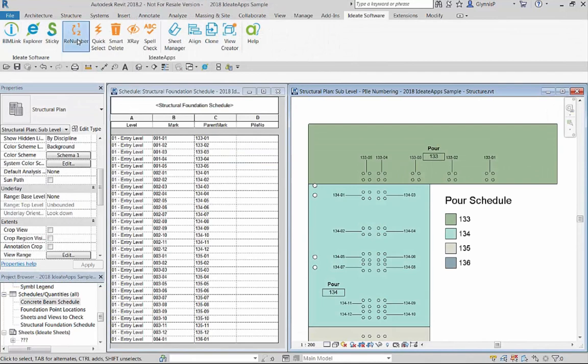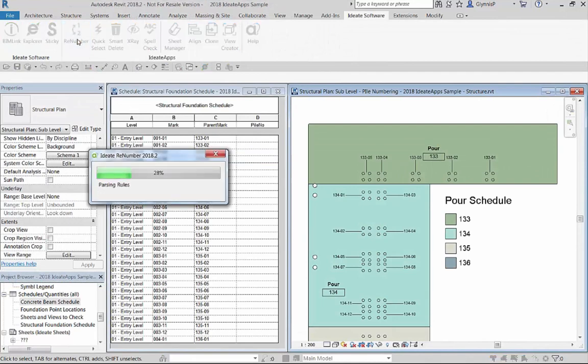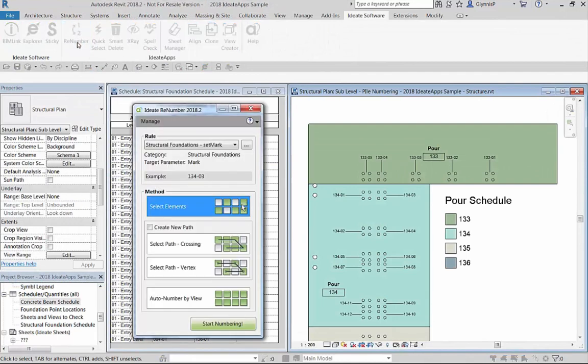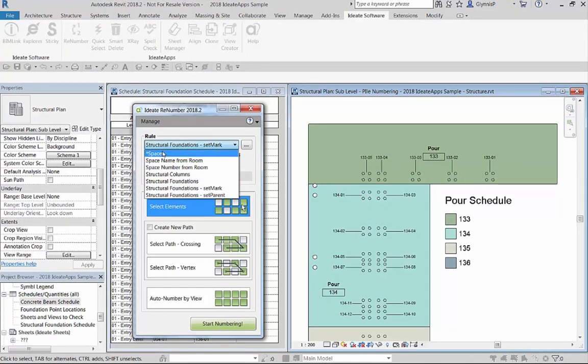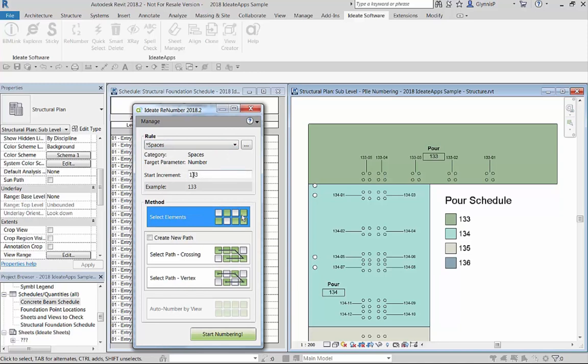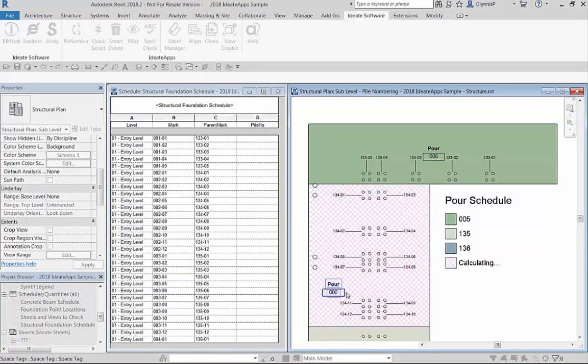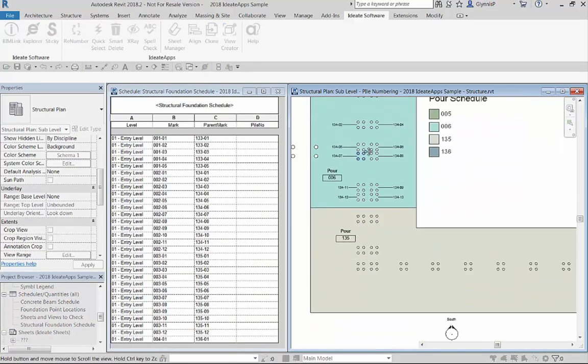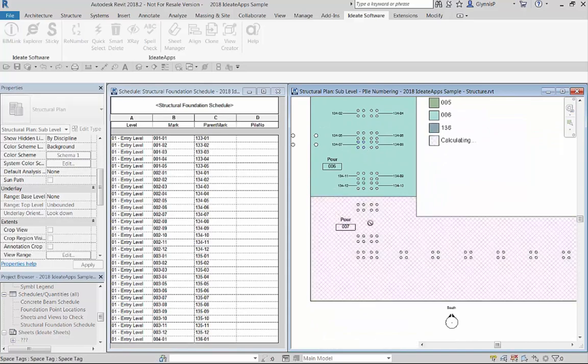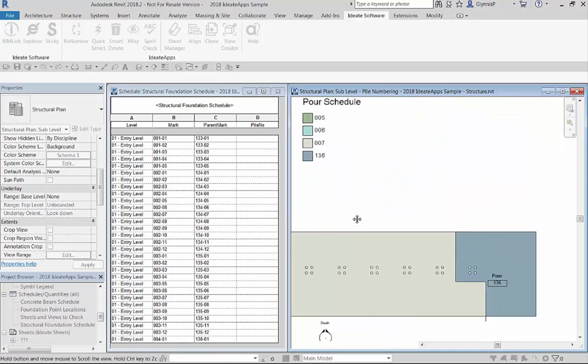Now that our family is set up properly let's shift our attention to the goal of identifying the pour sequence for our pile caps. As mentioned earlier we'll be using spaces as a way of identifying the pour sequences. We can use the built-in space rule to set up the pour numbers to meet our requirements and select each space or space tag to change the numbering as needed.